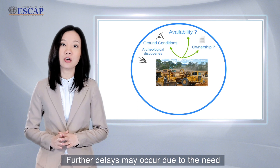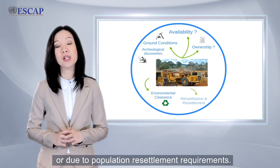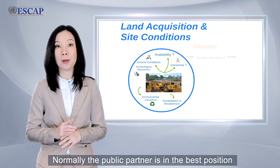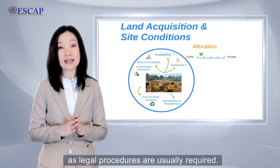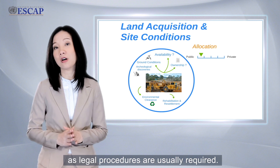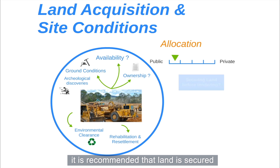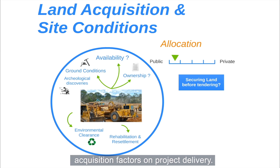Further delay may occur due to the need for environmental permits or population resettlement requirements. Normally, the public partner is in the best position to handle the risks of land acquisition, as legal procedures are usually required. Whenever possible, it is recommended that land is secured before the commencement of the tendering process, due to the potential impact of land acquisition factors on project delivery.